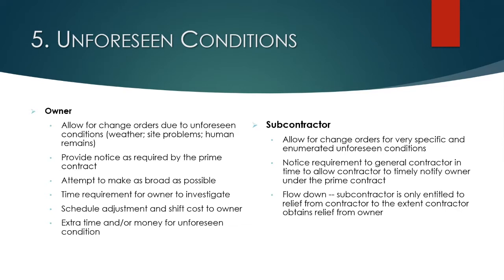Keep in mind that there's typically going to be a notice period in your prime contract by which you'd have to give notice of finding these conditions and follow those. Some contracts will spell out in very detailed fashion what that notice needs to look like. But when it comes to notices like this, you need to make sure you do your best to follow the provisions of the prime contract.